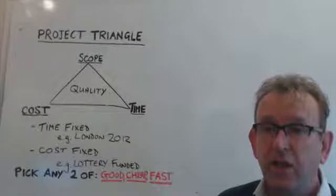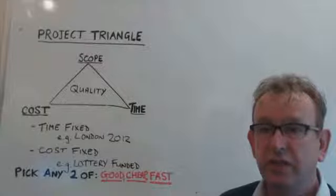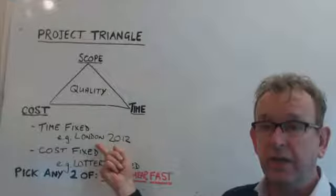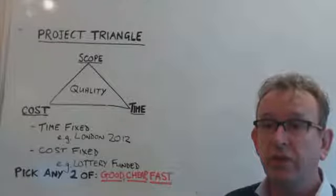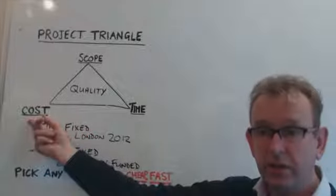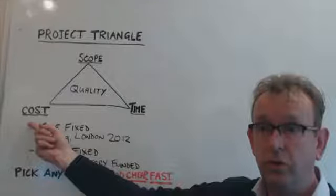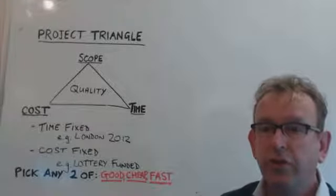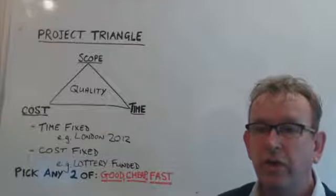Whichever sides of the triangle are flexible and not fixed means that you can look at those flexible sides to recover a problem with the fixed side. For example, if your time-fixed project is going to be delayed, you could look at the other two sides to help recover the situation. One possibility is to increase the cost by employing more people to complete the remaining work on time. Another, more extreme option, is to reduce the scope of the work, so that less work can be done in less time and you can hopefully deliver on time.